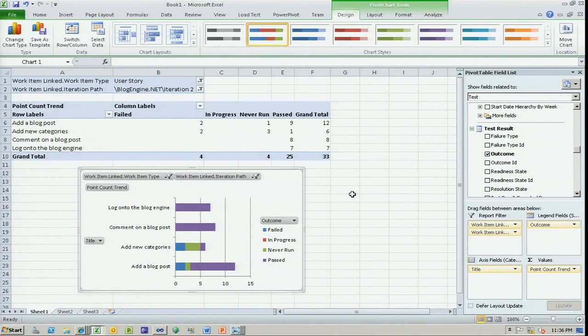And Jeff Levinson has a tool. He's in the front here. He'll probably be coming up a little bit later. He's got a tool which will let you open up your user story and say, show me all of the files that were impacted by it. And then you can drop down to see all the files. You can highlight the files and say, okay, now back-end that to the other user stories. And you can back-end it out to see all the other user stories that hit those files. That's one way you might want to do it, because when you do that, you can find kind of an impact to doing a major change. You want to change that first requirement. Here's all the code you may have to change. What other requirements might that impact? So there's a way to do that.